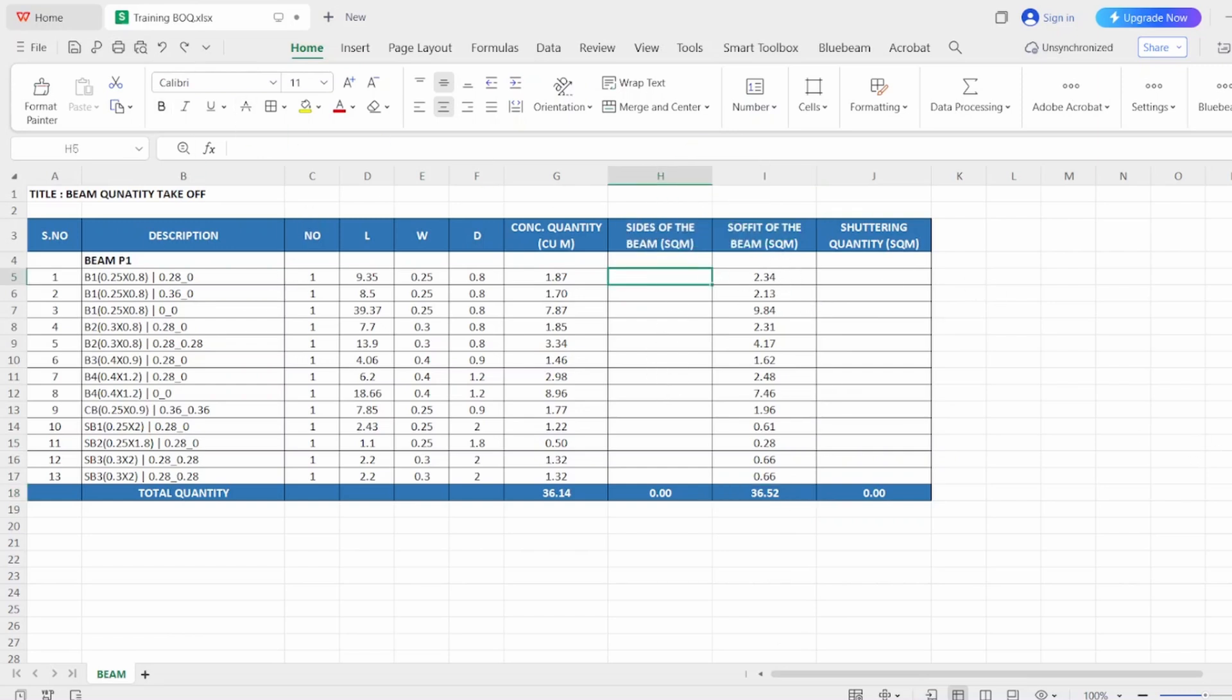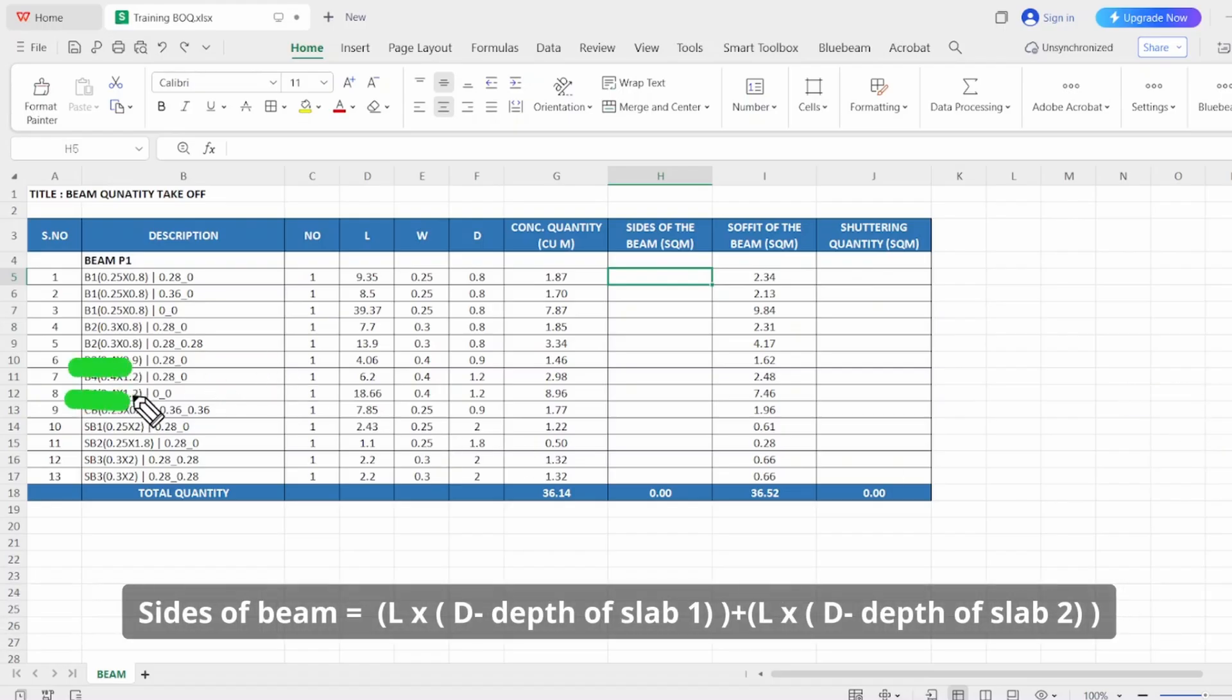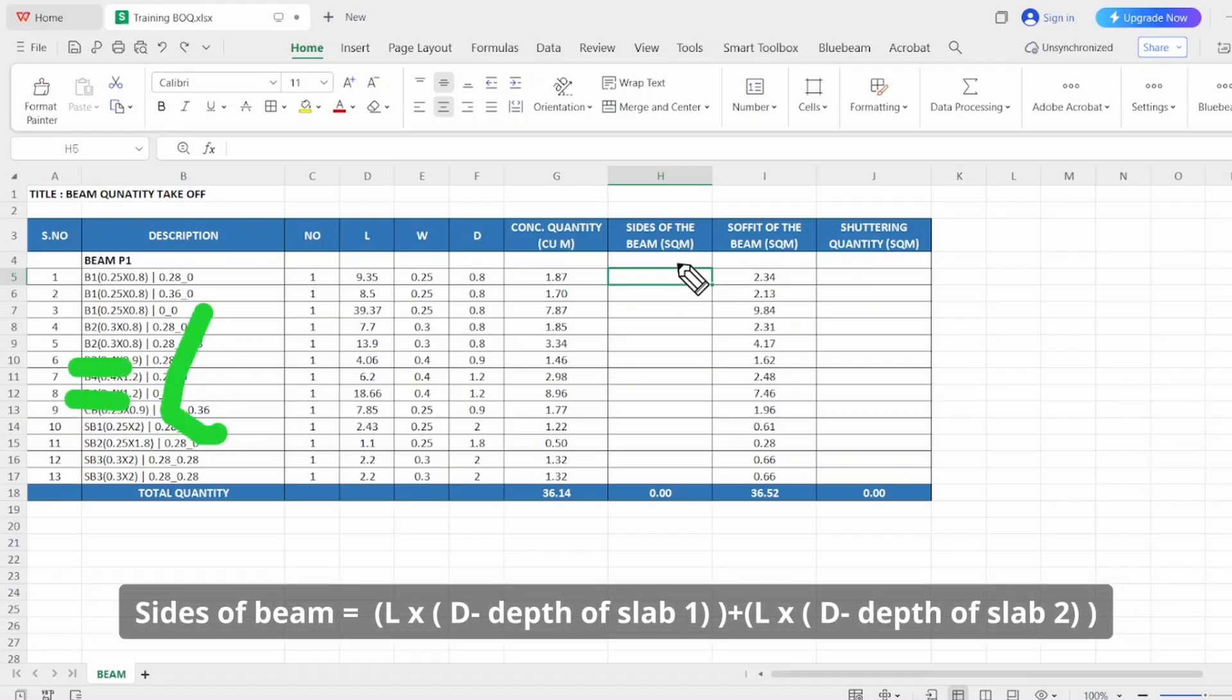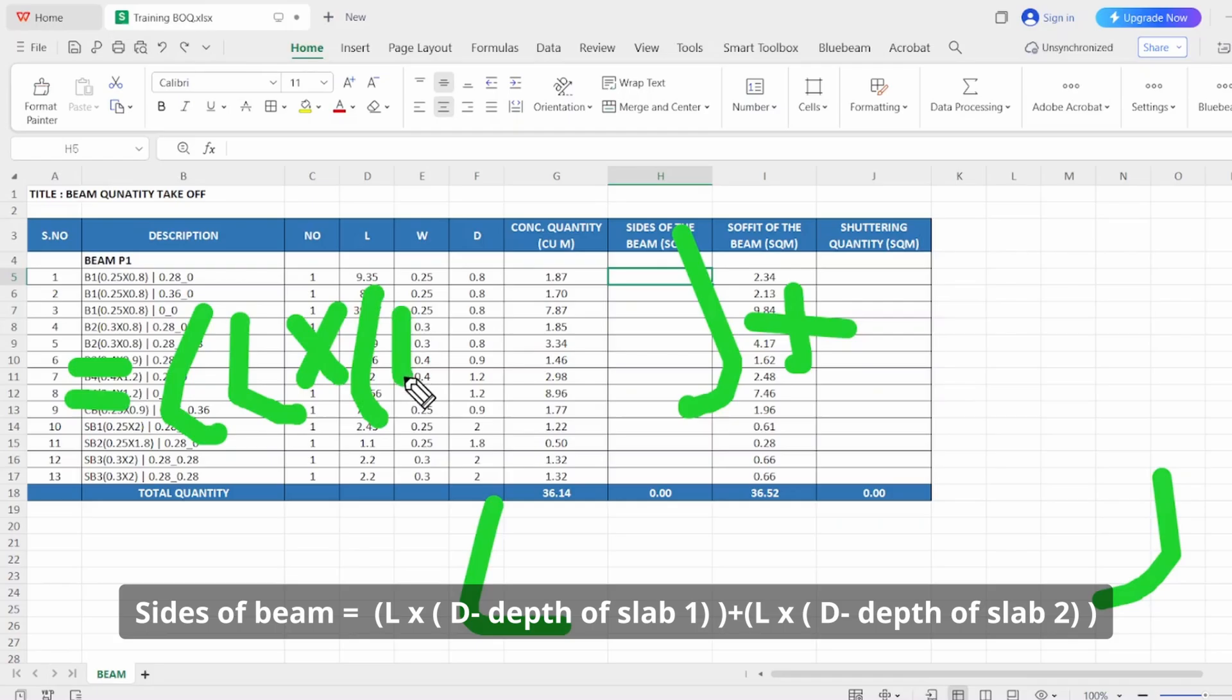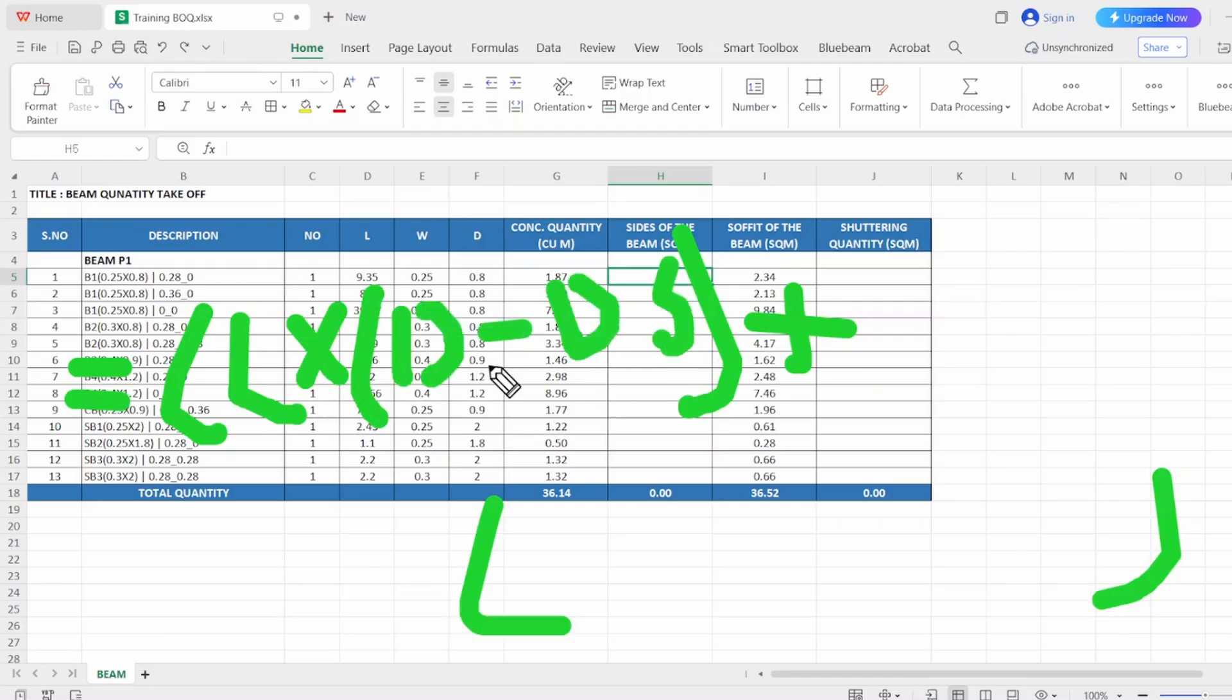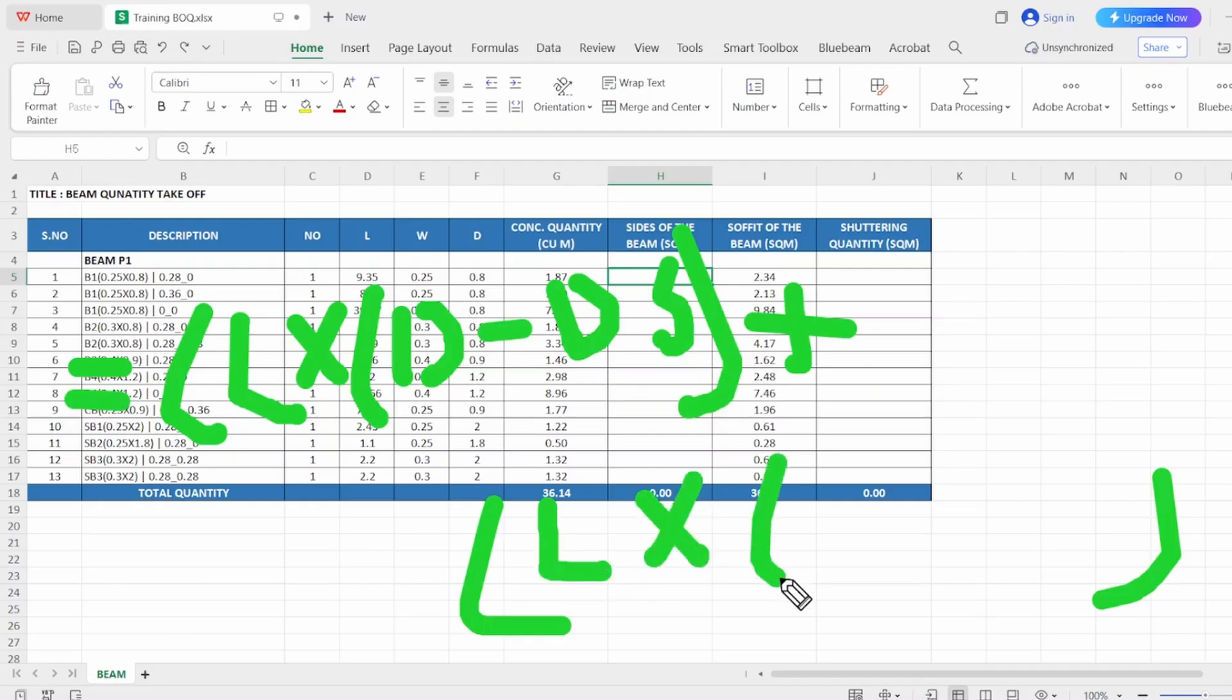So the formula of the sides is simple. Just let's write, divide into two parts: length of the beam multiplied by depth of the beam minus the depth of the slab. So same here goes: same length into depth of the beam minus depth of the other side slab. So this is the formula to calculate the sides of the beam.